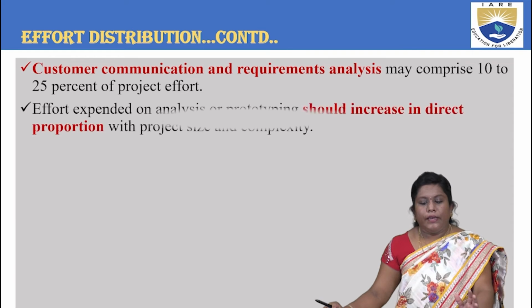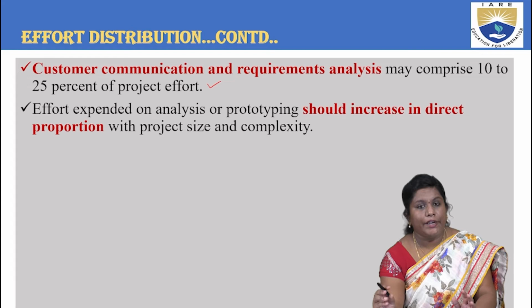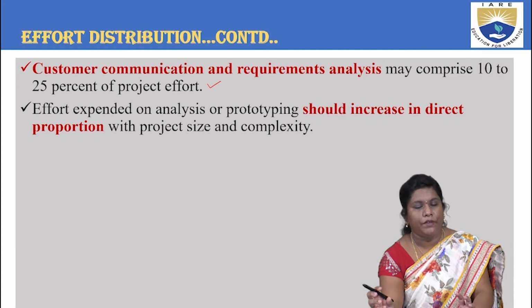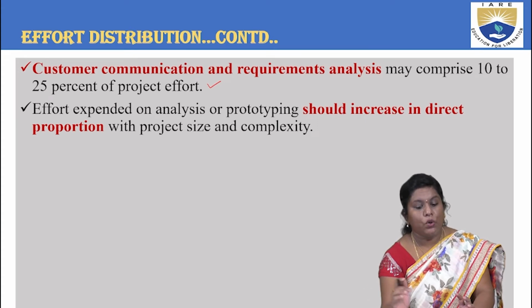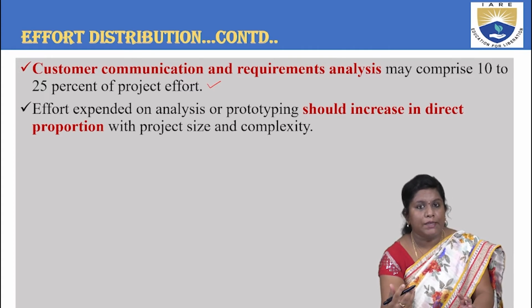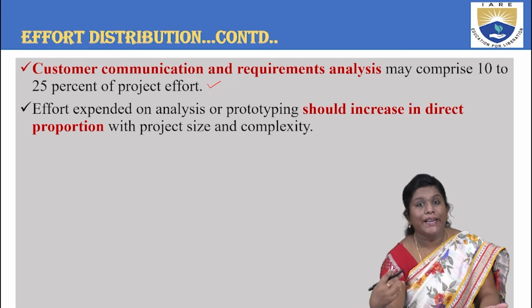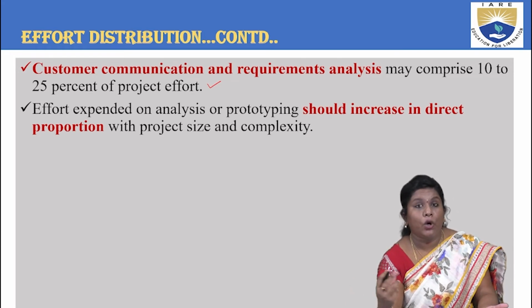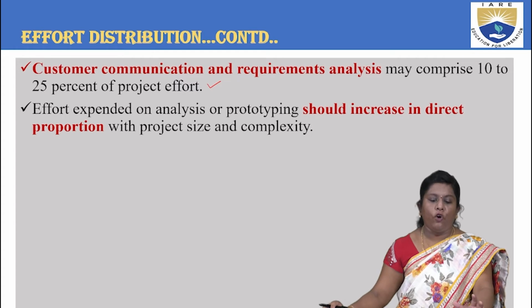Next, here the customer and the requirement analysis will try to comprise how much of the effort? 10 to 25% of the effort. So when you say customer communication and requirement analysis, customer communication meaning how many inputs are you taking from the customer? How does he expect you to build an application? Okay, what requirement analysis has to be done on the inputs you have taken from the customer? All this requires how much effort? 10 to 25% of effort.